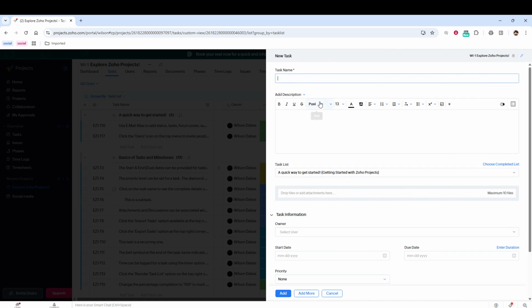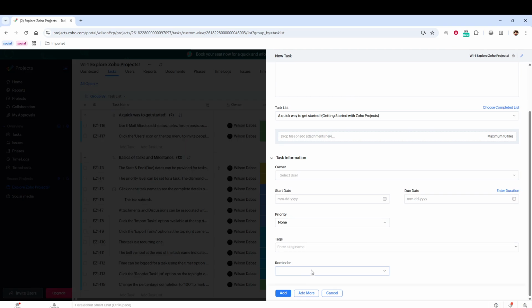In the top right, click the Add Task button. Type a clear task name. Use wording that describes the outcome, so anyone reading it understands what done looks like. Then click the Start and Due Date field to set the time frame and deadline. Setting dates right away is a simple habit that keeps schedules realistic and makes it easier to prioritize work.